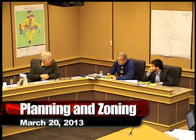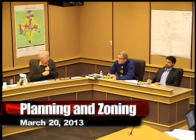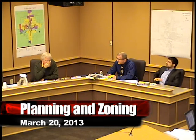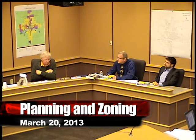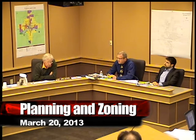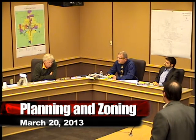Is that acceptable, to reduce the portion of approval for preliminary? Absolutely. You could reduce, you can't increase, per the public noticing. So if you want to demarc, state a point, and generally delineate it, that would be fine. You could just say that that area is not approved, or I was going to suggest to you, Commissioner Jackson, that western portion, the portion in question. You were talking about how that can maybe hang out there for many years. You could place a timetable on it and say that we want the final plat for that within 2 years. If it's not submitted within 2 years, then that portion needs to come back and be replatted. Either is a scenario in which you could do that.